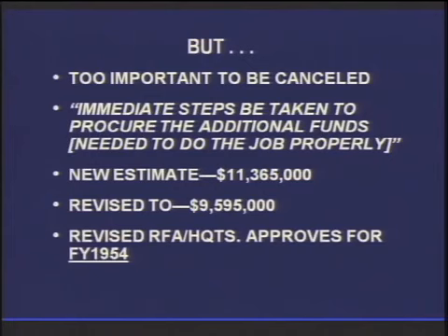So they argue back and forth. They look at the escalation factor, they look at what's nice to have, what's absolutely necessary, what would be good to have, but if we don't get it now, we can add it on later, and that sort of stuff. Even John Stack got involved in going through the list of stuff. First, they start talking about 9.25 million. Then finally, they agree on $9.6 million.